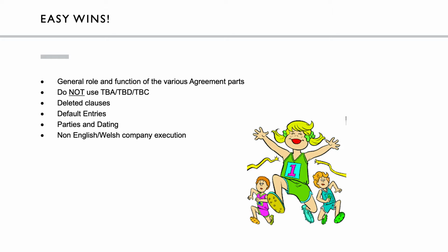And whilst there may not, on the face of it, be as much information to complete in the agreement as in perhaps the contract particulars that David and Tash will talk about, some key criteria is in essence defined in the agreement, such as the names of the parties, description of the works, contract sum, and the name of key roles such as employer's agent, principal contractor, and principal designer. So it is very important to get these key.